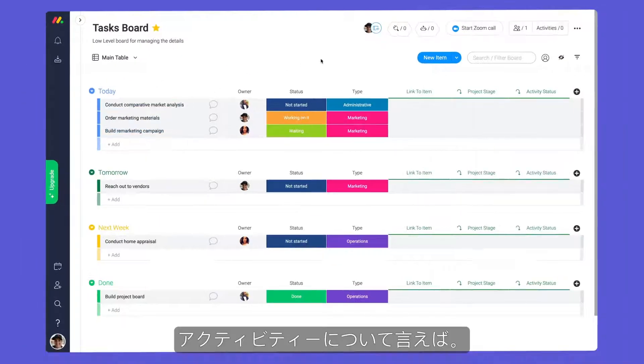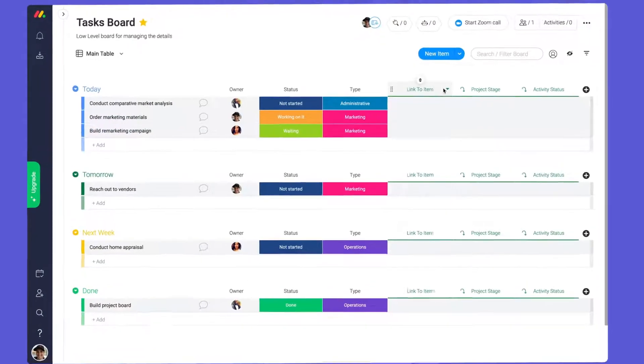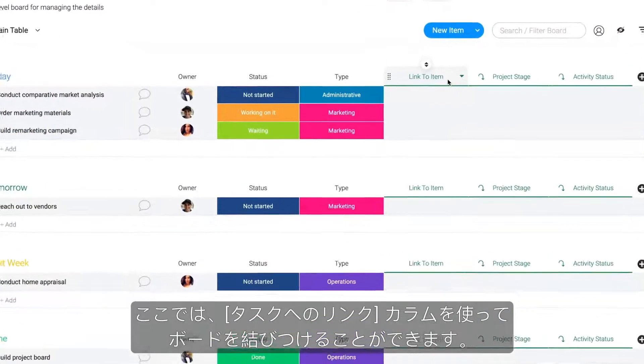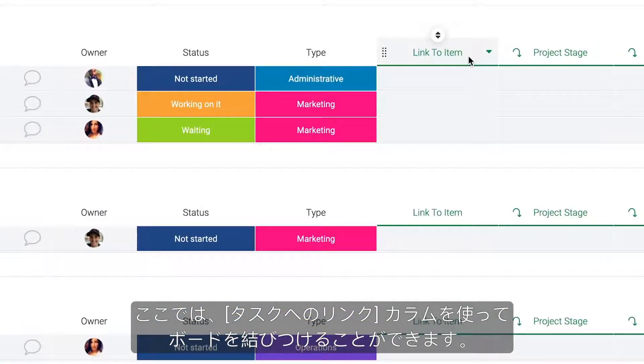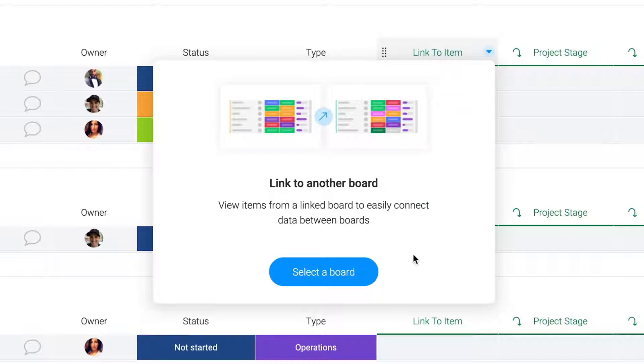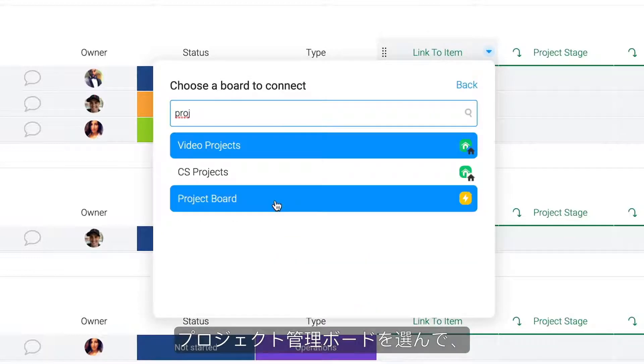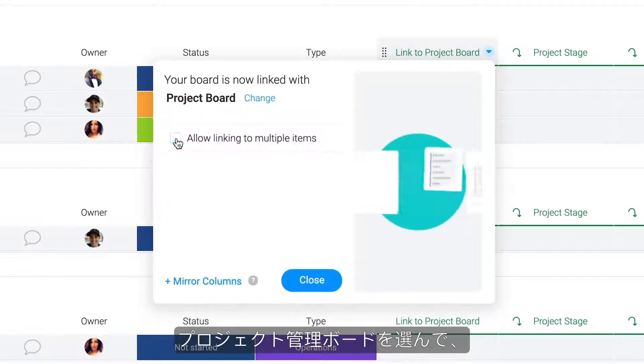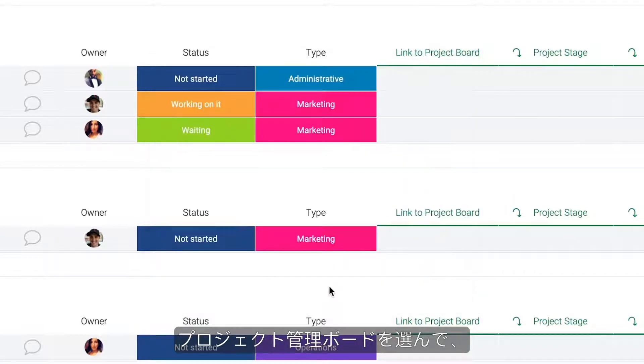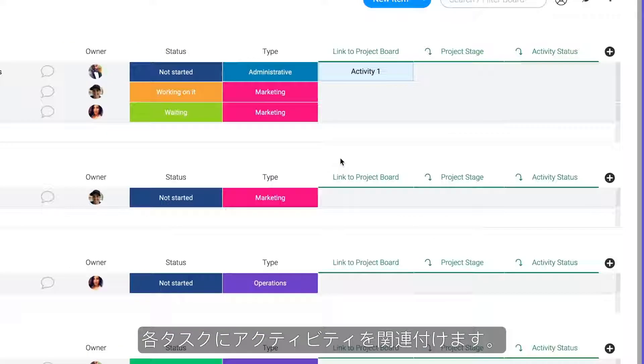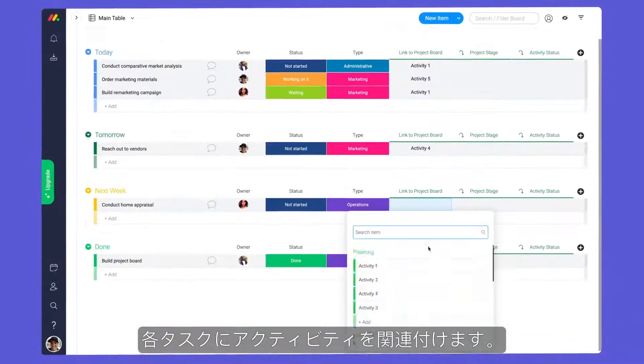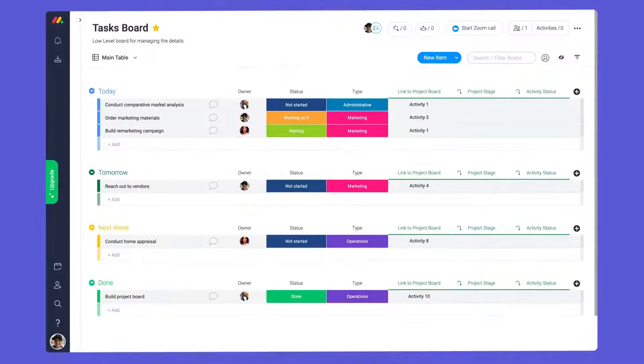Speaking of activities, here we can tie our boards together with the link to item column. Simply select your project management board, then designate the activity associated with each task.